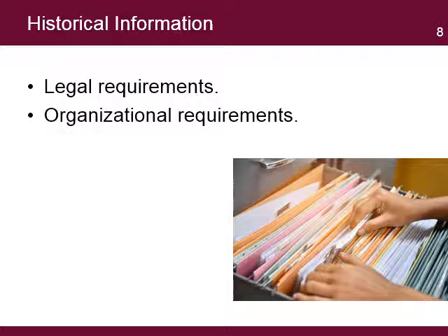An integral but frequently forgotten component of an information management plan is the maintenance of historical records. Historical project information is generally classified into two categories. Records the project is required to maintain based on donor or local government requirements. Records the project is not legally required to maintain but that have programmatic significance for development organizations.